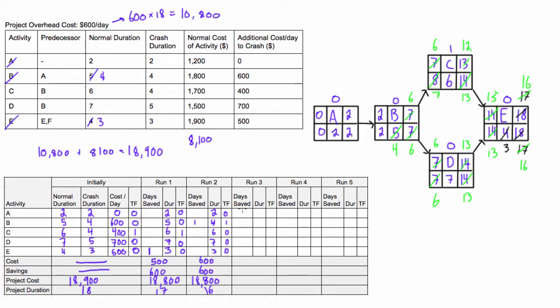So again iteration number three we need to find which one C or D is on the critical path. So let's see or D. Well, it's obviously D because its total float is zero. So we are going to be the only one we can crash is D. It would make no sense to crash C because it's not on the critical path. So let's go ahead. Let's go find D down here.